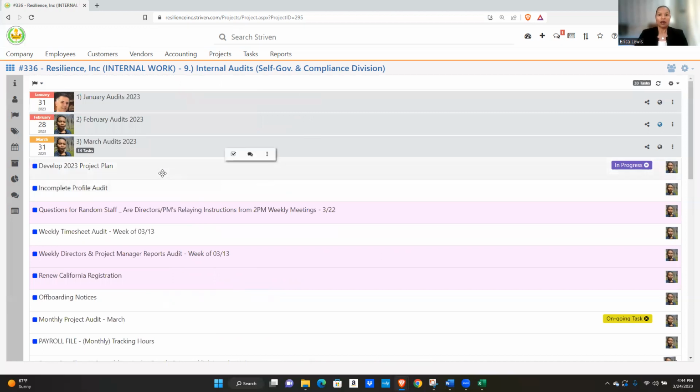Okay. As far as milestones, the milestone will be, in my case, it's the month, and the due date is the end of the month. So the last day of the month is the due date of that milestone for that month. So I have January audits, February audits, March audits, and within that milestone, I have 14 tasks for the month of March audits that I'm doing. Develop a 2023 project plan. Check out the incomplete profiles, which I just showed you how to complete your employee profile.